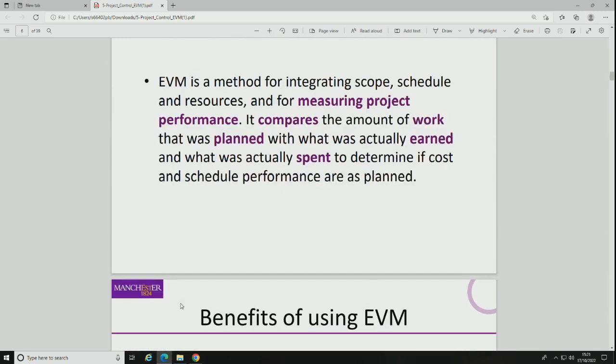So as I was saying, we've got this actual cost, the budgeted cost of work scheduled from the plan, and then the actual work which has been done, for which you would kind of guess, well, if we'd have got this far, it would have cost this. And that would be the budgeted cost of work performed, as best as you can. And sometimes it's difficult to say precisely how much work has been done in vague and uncertain complex situations, maybe in terms of software, electronics, where industries which are known to be volatile and uncertain and subjective as well, and dependent on the skill and expertise of workers, where it's difficult to say whether work is complete or not.